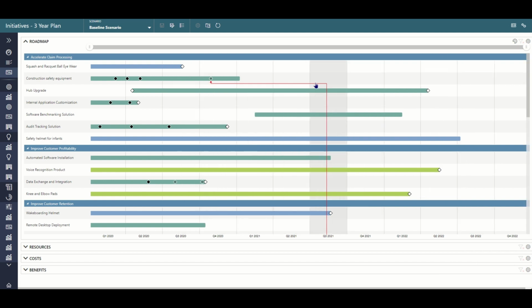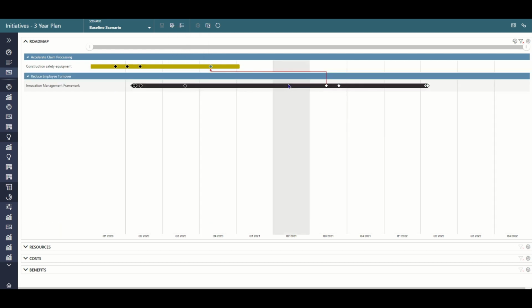Let's look at one of those milestone dependencies. So here we have an entity and it's related to something. Let's look at that relationship. I can filter down just on the related entities. What we can see here is that we've got a broken relationship. This milestone should happen before this one. It's an interactive roadmap. So I can grab this entity and I can move it over here to the right. And at the point where we pass that relationship and it gets fixed, it will turn from red to black. And now that it's black, as I move this entity, it will pull the two in concert. Okay, same if I move the bottom one. Let's show all of the entities again.